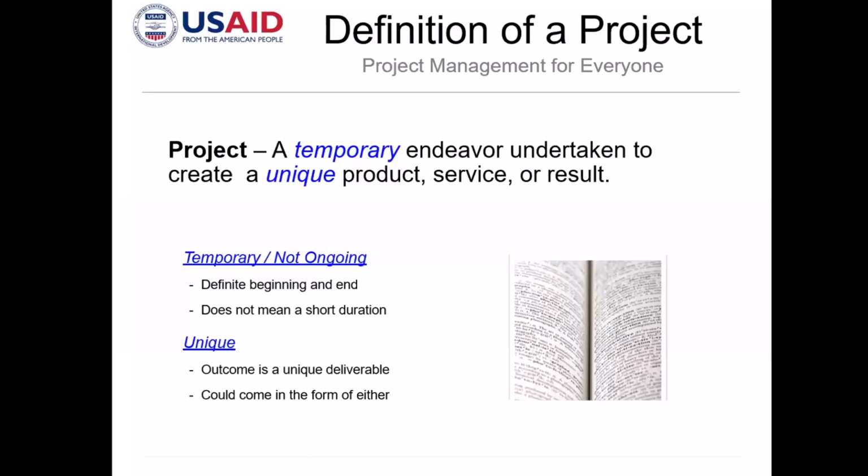So there's no such thing as an ongoing project. For example, if you guys would be assigned to deploy an O-RAN network, right? Somewhere you have to finish the project, close it, and turn it over to operations. After that, the project should be closed. It should cease to exist, right?